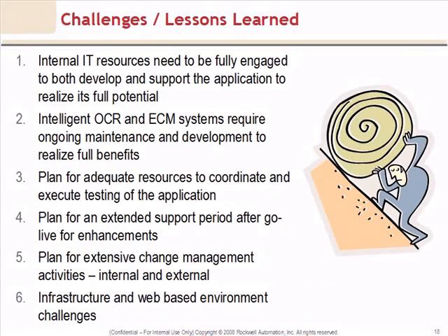Some of the challenges and lessons that we did learn going through this process. Number one on the list was that we need to have internal IT resources that are fully engaged, both to develop the application as well as to support the application to realize its full potential. Our struggle within Rockwell, because of our multi-year SAP deployment project, was that a lot of our resources are heavily engaged in that project, so we did have to beg, borrow, and steal resources. One of the key things is to make sure they're engaged from the start of the process on the development side, because they are going to also have to support the process after you go live.